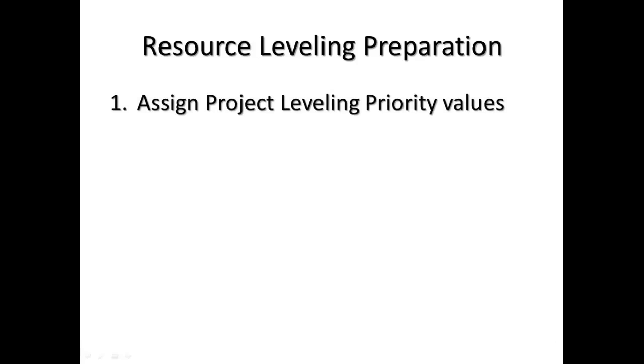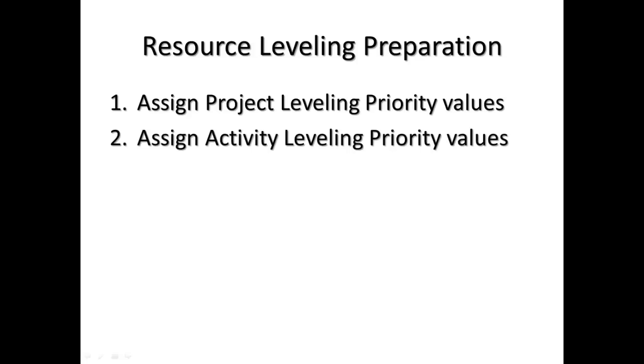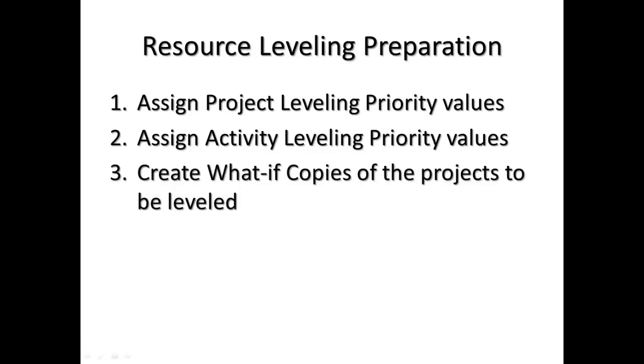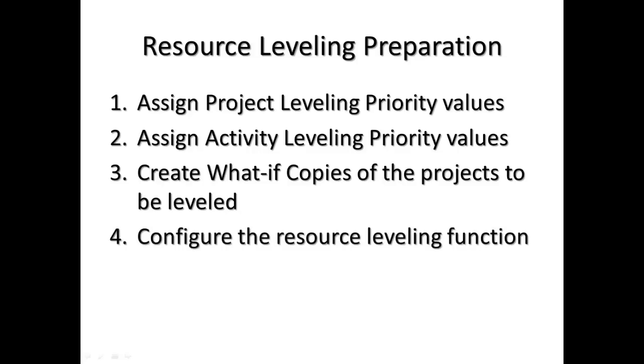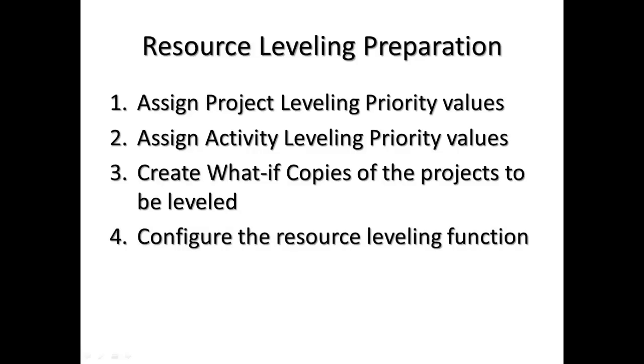Preparation: To perform resource leveling, you will need to prepare the following items. 1. Assign project leveling priority values to each project. 2. Assign activity leveling priority values to activities within each project. 3. Create what-if copies of the projects to be leveled. 4. Configure the resource leveling function.